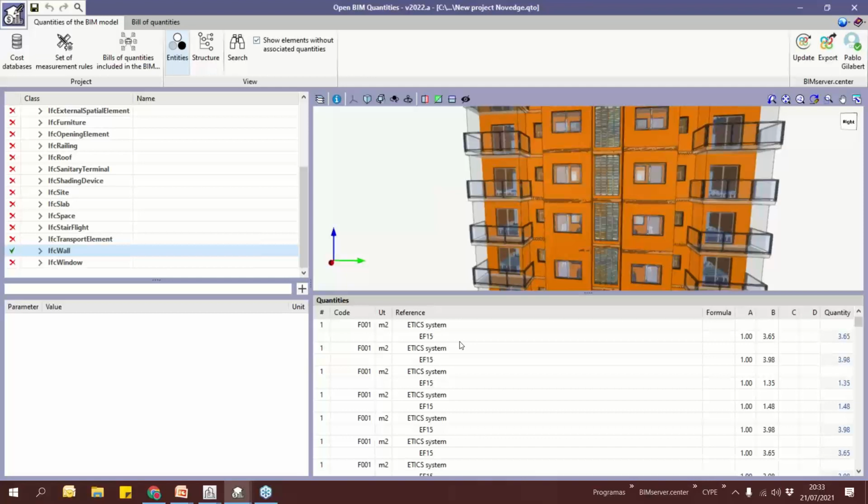This is the total amount we have of all the different walls connected to this insulation panel I have defined. But this is not correct, because in general the solar panels are just located in the facades, not in the interior walls. So we need to specify the filter in a better way.